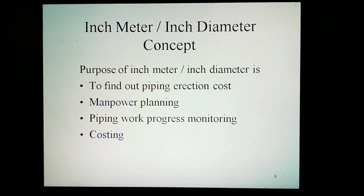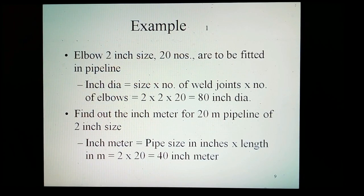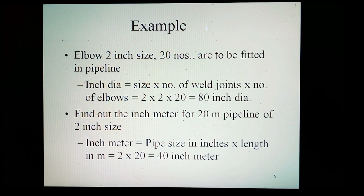Inch-meter and inch-diameter concept. The purpose of inch-meter and inch-diameter is to find out the direct cost, to do manpower planning, pipe work progress monitoring, and costing. Consider the example: there are elbows of 2-inch size, 20 numbers, to be fitted in a pipeline. Inch-diameter = size × number of welds × number of elbows = 2 × 2 × 20 = 80 inch-diameter. Inch-meter for 20-meter pipeline of 2-inch size = pipe size in inches × length = 2 × 20 = 40 inch-meter.